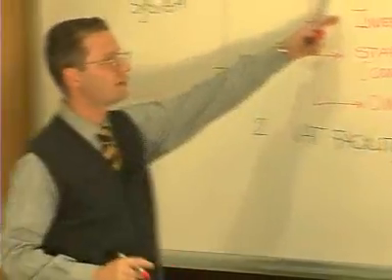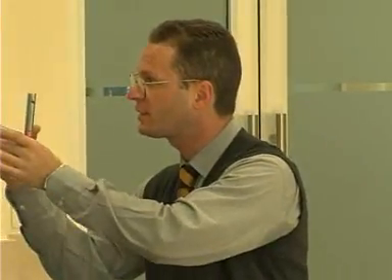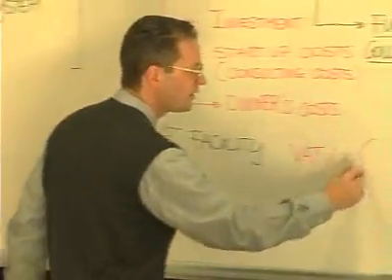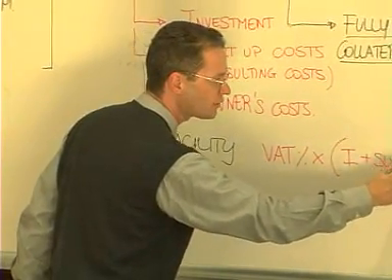And that's why this value-added tax facility should be, more or less, the value-added tax percentage times the value of investment, startup costs, and owner's costs, without including, obviously, the complication that sometimes value-added tax percentages can be different. But anyway, in a very simplified setting, the amount of the value-added tax facility should be the multiplication of value-added tax times the value of these three items: investment, startup costs, and owner's costs.